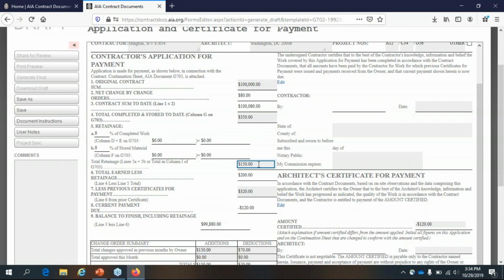the retainage. You can see that I put in a value in column I, so it just brings that over. This is variable rate retainage. It's just bringing over the total of column I from the G703. So that's all that is. And you can change this number. I can't put anything. You can see this is white over here, so I don't put in a percentage because this is not fixed anymore. This is variable. That's the only difference.